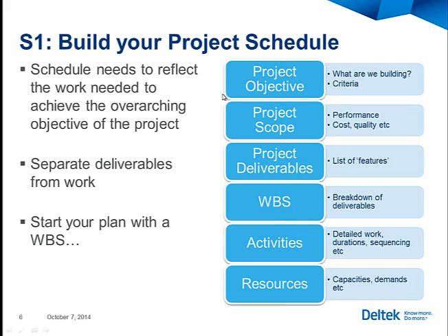So when you're thinking about these, especially down to the resource level, it comes down to more than planning an individual project. You need to look at your whole portfolio and say, yes, I am competent at delivering this type of work. Am I competent at delivering this type of work right now, given the other resource constraints that I have for the other customers that I'm trying to satisfy? So scheduling just got bigger for us now. We're scheduling not just at the individual project level, but we're dealing with potentially constrained resources at the broader portfolio or enterprise level, and we need to take that into account as well.